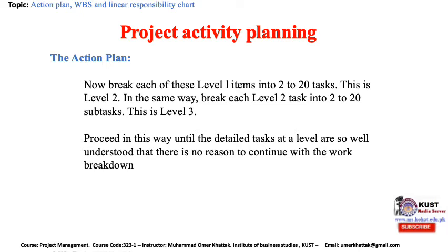The logic behind this simple rule is persuasive. We have observed both students and professionals in the process of planning. We noted that people who lack experience in planning tend to write down what they perceive to be the first activity in a sequence of activities, begin to break it down into components, take the first of these, break it further, until they have reached a level of detail they feel is sufficient. They then take the second step and proceed similarly. If they have a good understanding of a basic activity, the breakdown into detail is handled well. If they are not an expert, the breakdown lacks detail and tends to be inadequate. Further, we note that integration of the various basic activities was generally poor.